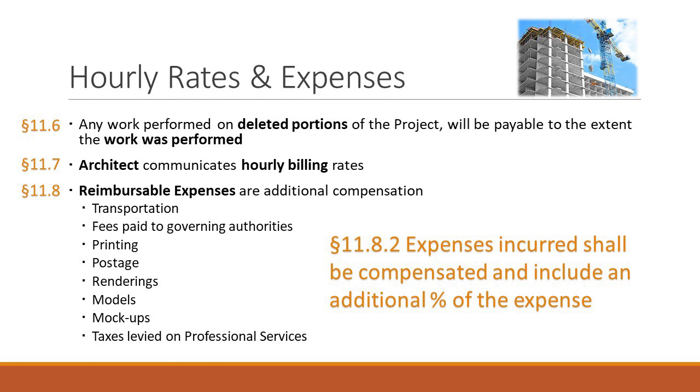Well, the compensation is based on a percentage of the cost of the work. So I get paid, and that's another common way to do it, I get paid 10% of the cost of the work of the project. Any portions of the project that are deleted or otherwise not constructed, compensation for these portions of projects will be payable to the extent the services are performed on those portions. So let's talk about that.